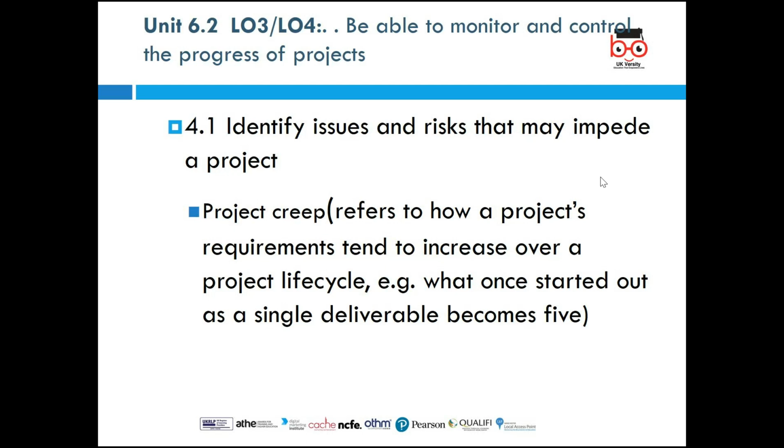If it's a road construction, if the thickness of the asphalt on the road is going to be 2 inches, which is planned initially, and then in the course of the project, the sponsors decide that the asphalt thickness should go up to 5 inches, this means that the requirement of the project has changed, and this is going to pull the project back.